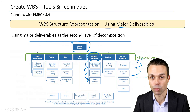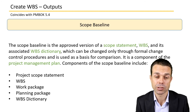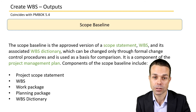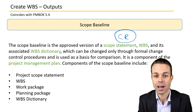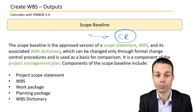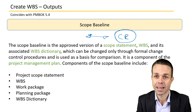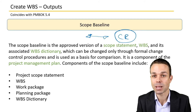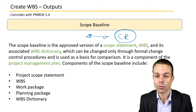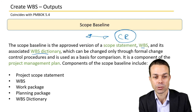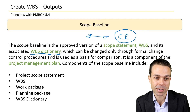The outputs include the scope baseline — putting all this information into the scope baseline, which is our baselined document requiring a change request if changed once baselined. We usually baseline it after we have the Work Breakdown Structure, not before, to avoid going through a change request just to add detail. You might also use an iterative approach, which can be written into your project management plan. The scope baseline includes the scope statement, Work Breakdown Structure, and the associated WBS dictionary.